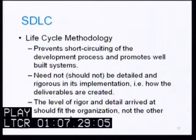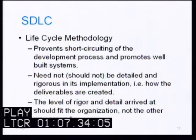Life cycle methodology also prevents short-circuiting of the development process and promotes well-built systems. It need not, in fact should not, be detailed and rigorous in its implementation, meaning in how the deliverables are created. The level of rigor and detail arrived at should fit the organization, not the other way around.